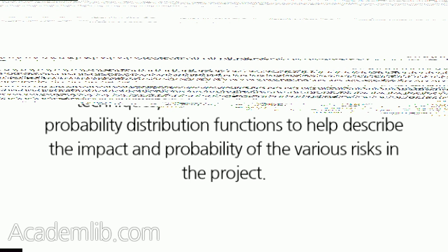General statistical techniques. Since risks are associated with probability techniques, it seems natural that we use probability distribution functions to help describe the impact and probability of the various risks in the project. Figure 8.3 shows a skewed probability distribution. This is typical for project cost and schedule risks.